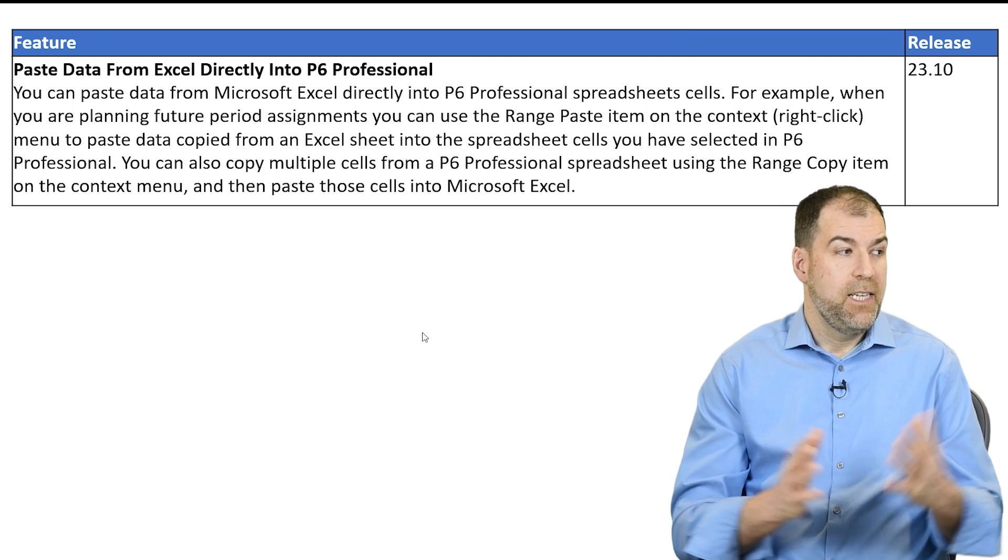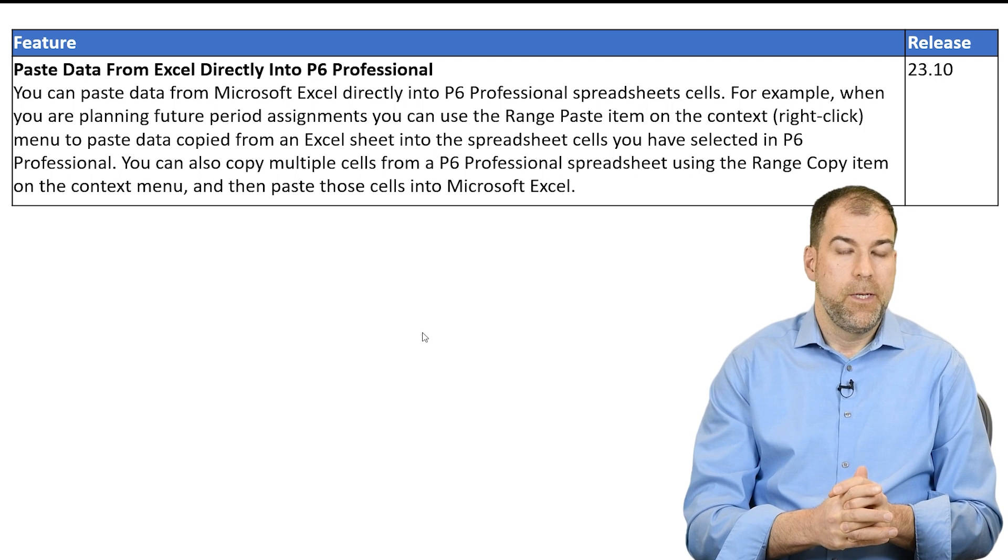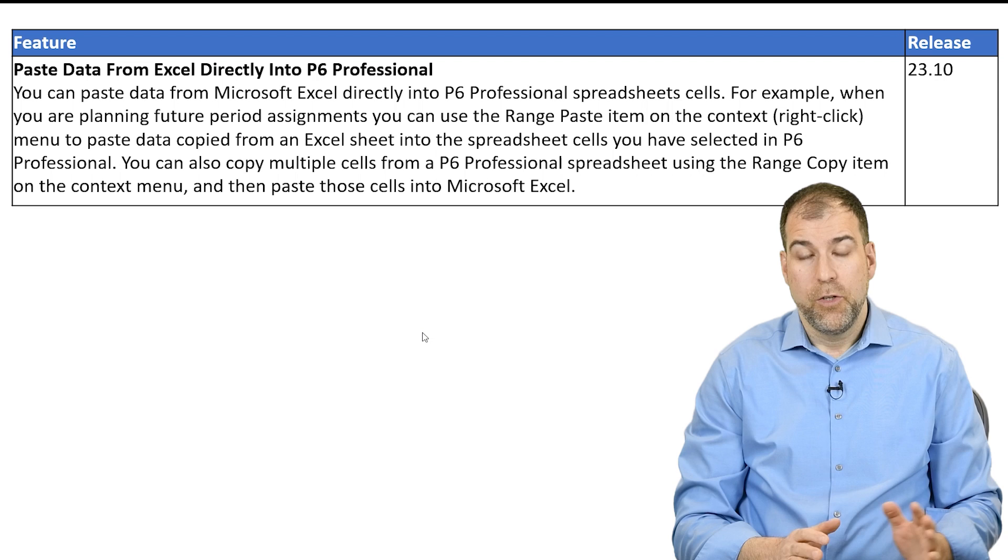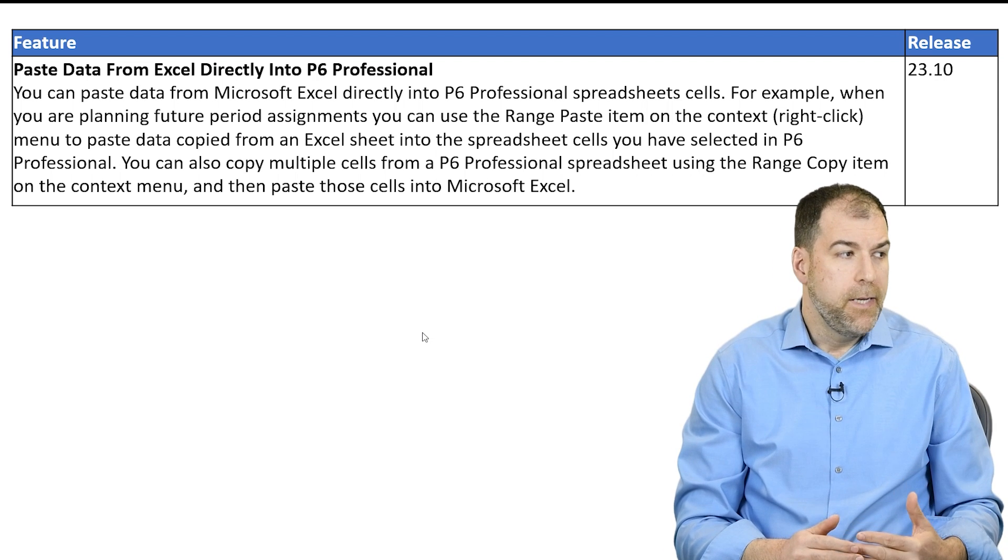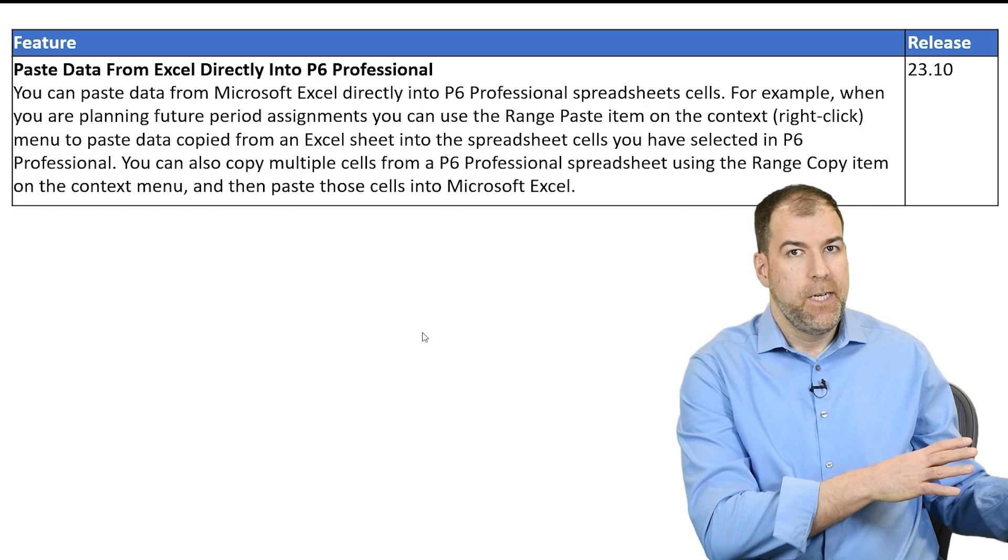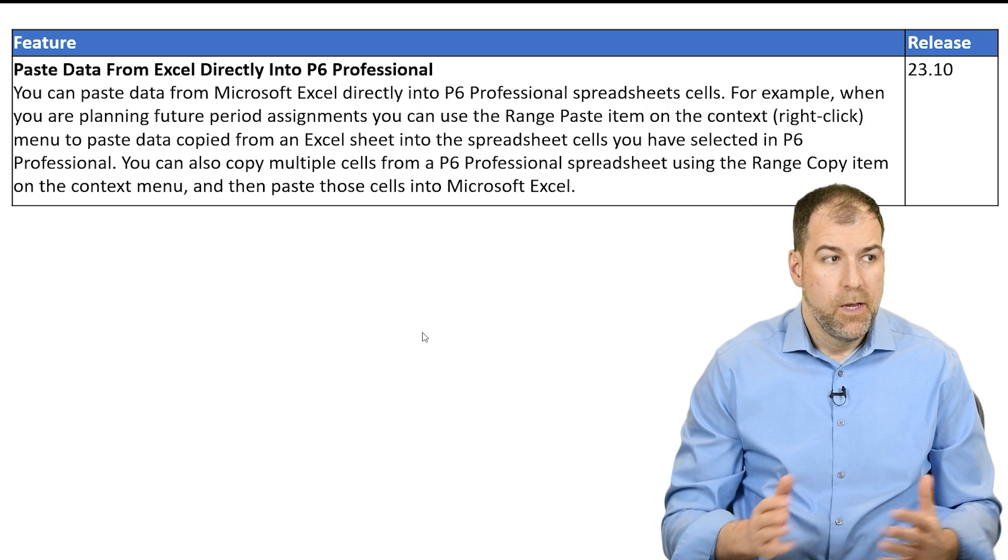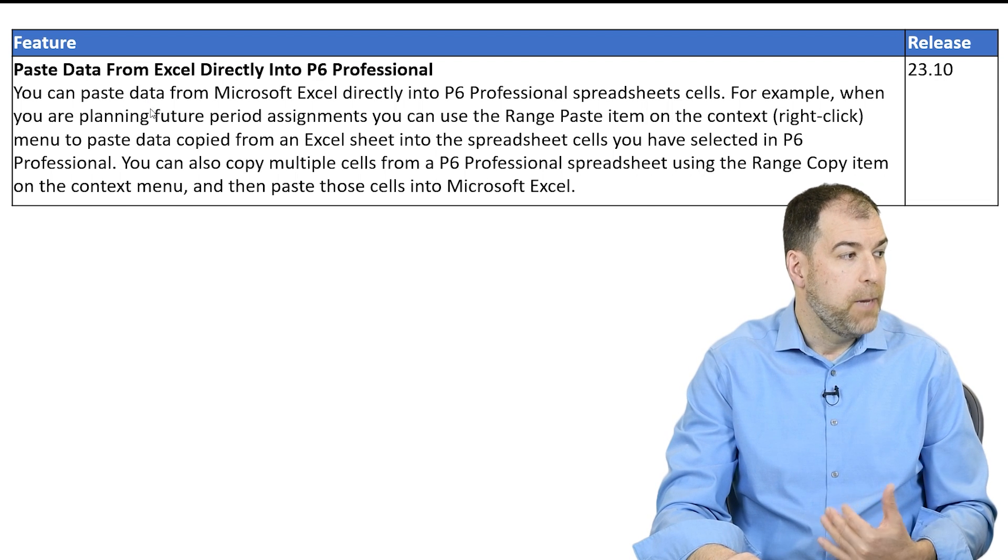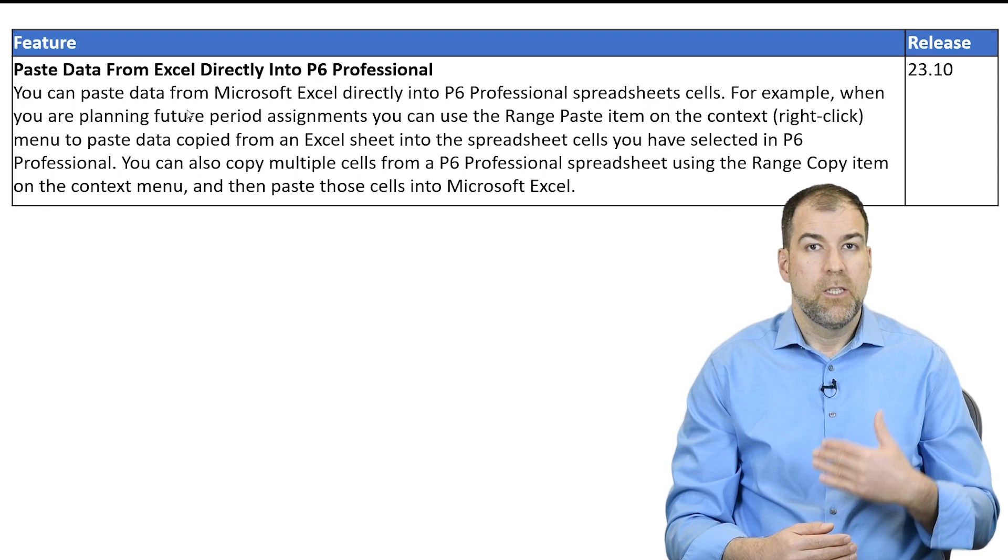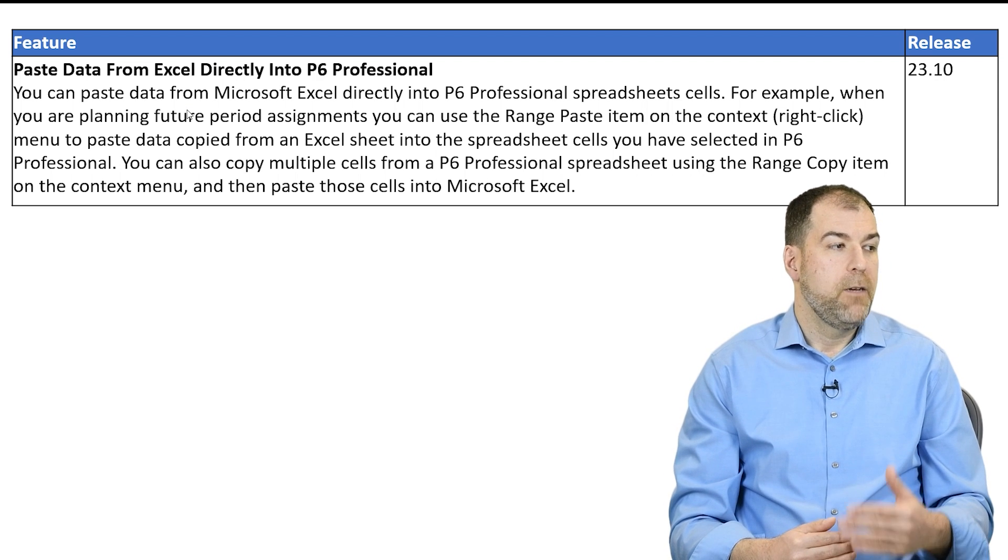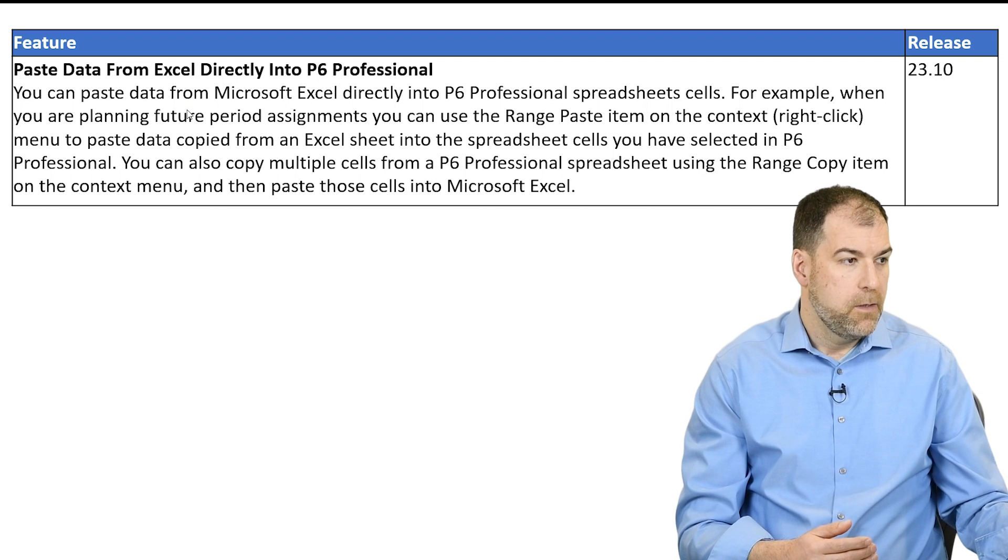The next update says paste data from Excel directly into Primavera P6. Hold on. It's not what you think. I got excited too, because actually we saw something similar in a previous release. But I was hoping we could take activity data from Excel and paste it and create activities. But it doesn't work that way. What we're talking about here is it says you can paste data from Microsoft Excel directly into P6 spreadsheet fields. For example, when you're planning future date assignments.